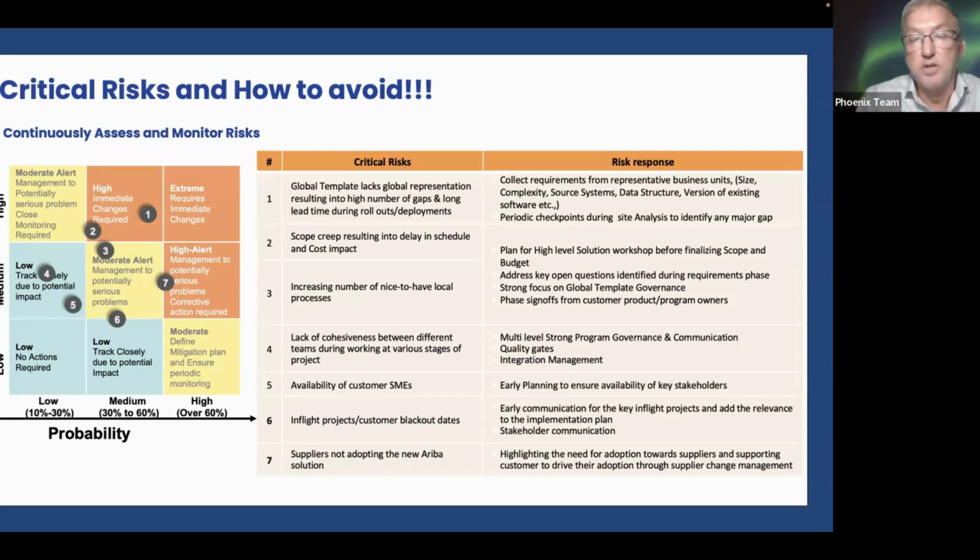I'm in my design phase, and I want A, B, C, D. At the end of the design phase, you get sign off, right? Once you have that sign off of your design, there are no changes to the design, none, because what's signed off in design has to be built. And if you keep designing in the build phase, you'll never get to your testing phase. So that's extremely important. You have to have sign off on each gate.